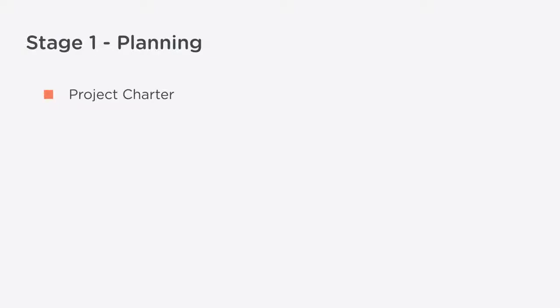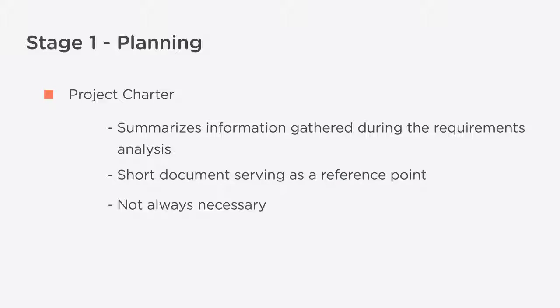And depending on who you talk to, the second step is creating a project charter. The charter takes all the information gathered in the previous step during the requirements analysis and summarizes that information. It serves as a reference document both to you and the client and is usually short and to the point. You can find varying opinions on the usefulness of project charters. Not everyone deems it necessary.